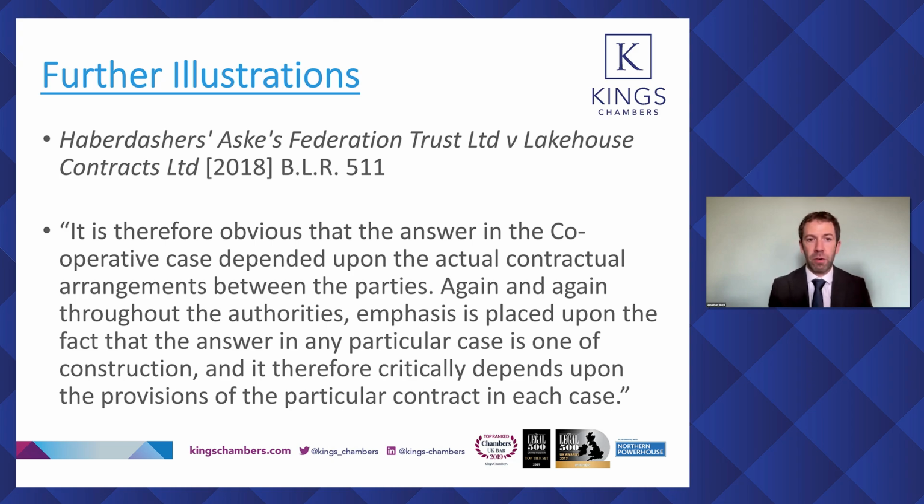So whether or not a co-insurance defence will succeed will depend almost entirely in this context on what the building or engineering contract says about liability and about the insurance arrangements that the parties are obliged to set up. And taking that one step further, it may be the case that a co-insurance defence can be mounted and can succeed even where there is no insurance policy. And I'll explain what I mean by that.